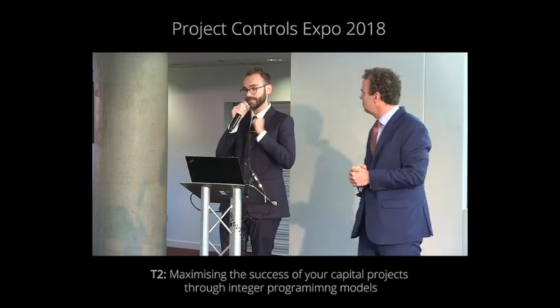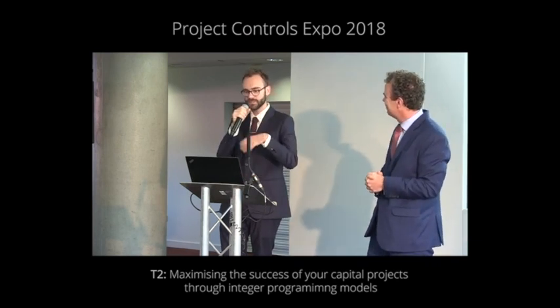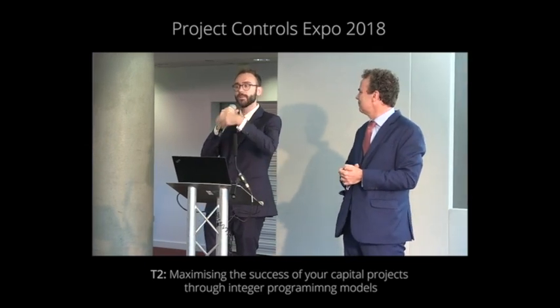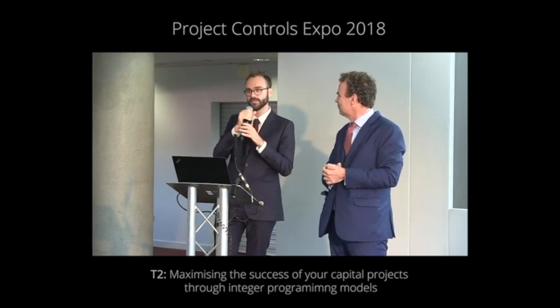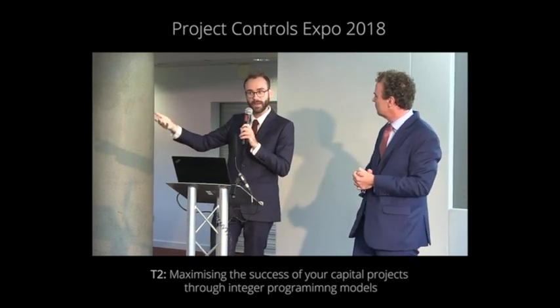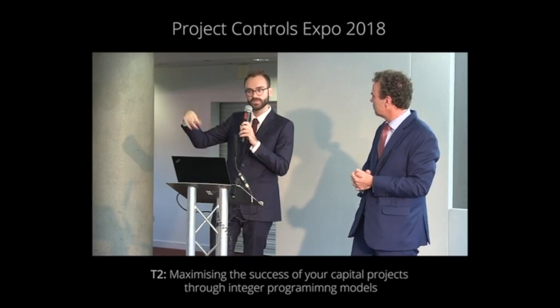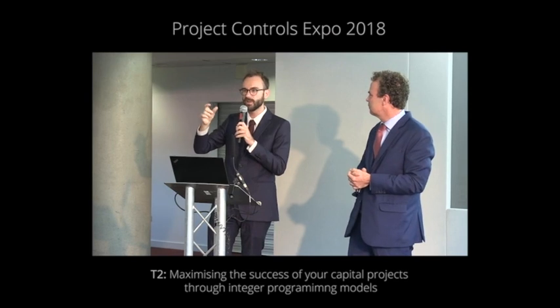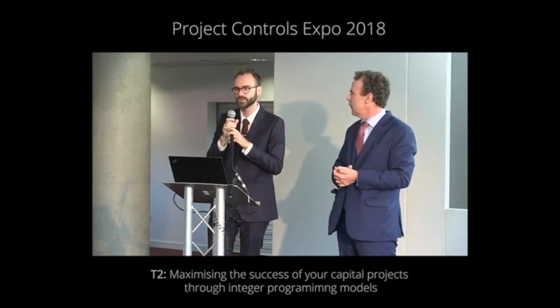My short take is yes, risk can be incorporated. There are a few different ways depending on if you have ideas of the probability of risk, or if you have ranges. So for example, if you have a good hunch that your project is going to cost between X and Y, we can run the model subsequently, do one solve with it costing X, do one solve with it costing Y, do a bunch in the middle, and get a sensitivity analysis that way. So we have a few methods.